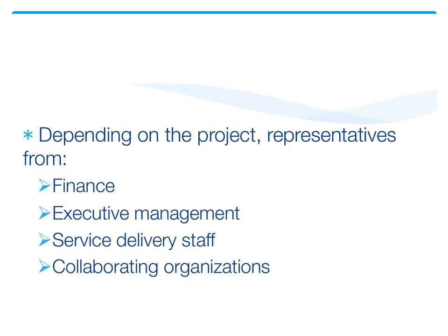So this slide talks about the project team. I talked about this a little bit more, but depending on the size of your organization, a team should never be more than about 10 or 12 people, and that would be with a really large organization. The reason for that is when you get too many people in a room, you tend to just get really muddled in side conversations and tangents, and it's a very hard group to control. I like to see a project team no more than 12, absolutely no more than 12. 6 to 10 is really good. If you're a small organization, it might be 3 to 5.